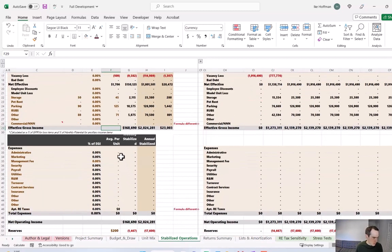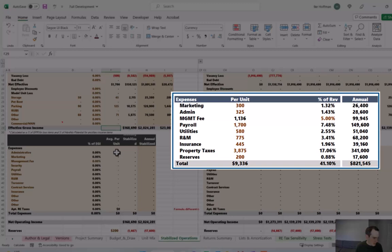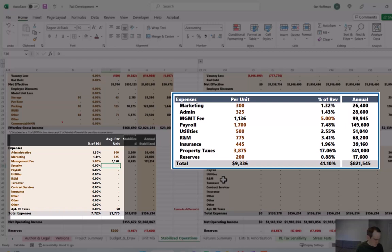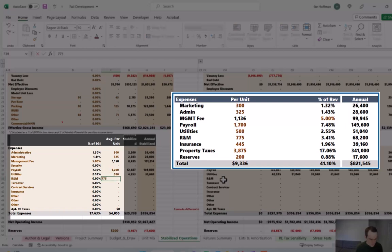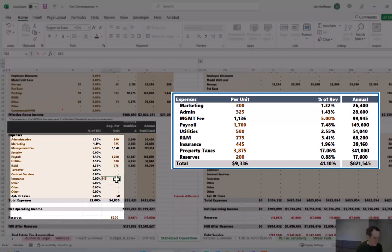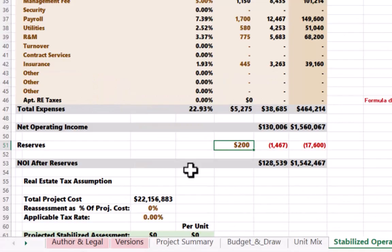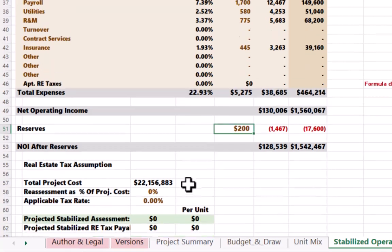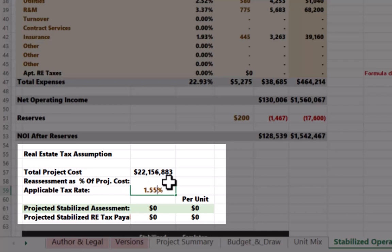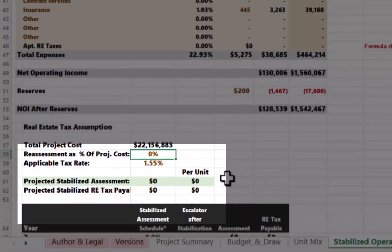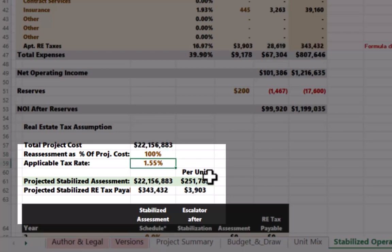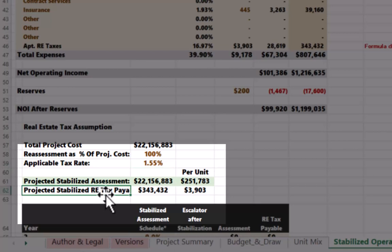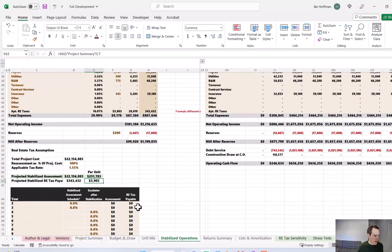Let's refer to our vetted deal information for these inputs as well. We looked at property taxes for comparable properties, and we determined that property taxes per unit, once this property was stabilized, would be around $3,900 per unit. We know that the applicable tax rate in the jurisdiction is 1.55%. And then we can just play with this reassessment as a percentage of project cost to back in to the correct stabilized per unit. And coincidentally, that is right around 100%. So if we plug in 100%, you can see that the projected stabilized real estate taxes payable equals $3,903. That's close enough.